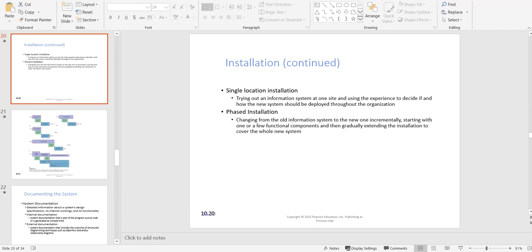The phase which you are releasing early should be developed first, and so on. It reduces the burden on the system development team, as well as makes the development faster, because rather than developing the whole application, you are developing it in an incremental way. This also limits the downside or any errors, and reduces the risk.